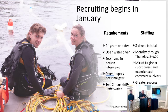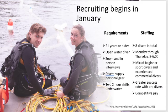The way we break up our day is that we do a 10-hour day, and there's an hour in the morning of setting up, an hour at night of breaking down, and then each diver dives roughly between an hour and a half and 2 hours per day, twice. So 2 shifts of roughly 90 minutes to 120 minutes. We work Monday through Thursday, and the idea behind that was to leave the lake open for recreation Friday, Saturday, even though it doesn't interrupt too much. We just didn't want the divers on the lake on Fridays.